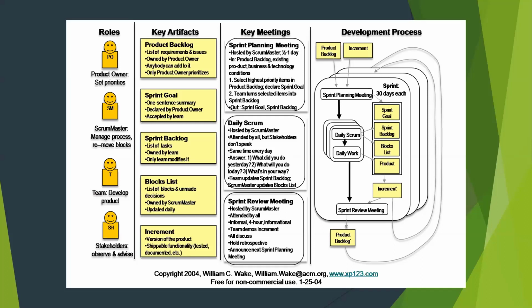The sprint review meeting happens at the end of the sprint cycle. That's where the team gets together with the product owner and the key stakeholders and reviews what's been delivered for that cycle. Then you get agreement, and as part of that sprint review meeting is a retrospective about what could be done better during the next sprint cycle. On the right is a diagram of a typical sprint cycle and how the product backlog and constant iterating fits into this agile approach to managing a project.